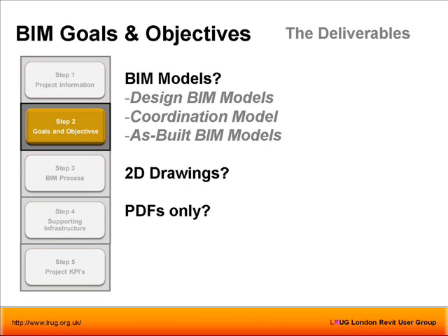Right. Okay. Because we were still in a federated model environment, not lucky enough like Carl or others with a multidiscipline setup. So there were different companies doing MEP, architecture, roofing contractor, cladding contractor, and the ultimate responsibility was the contractors' to make sure that the record models or as-built models we provide meet the information that they provide. And if they don't provide information on time, or at all, then we don't update the model, as simple as that.